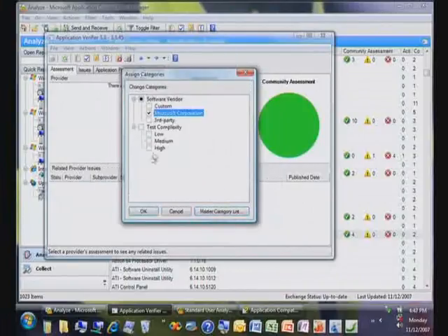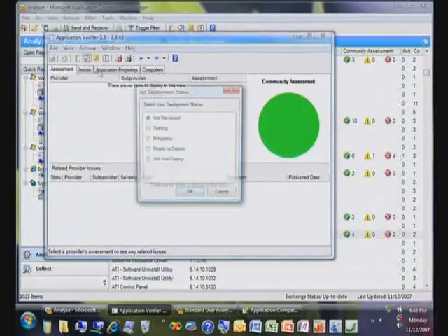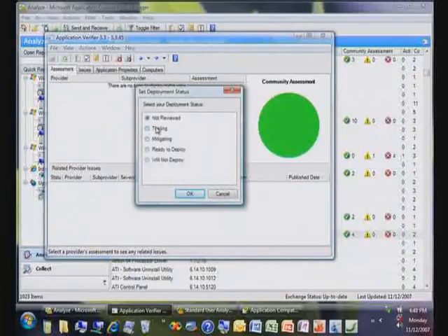So this is made by Microsoft, probably going to be fairly hard to test. Right? I can keep track of where I am in the process. Have I not started? Am I testing it? Have I finished testing and I know what's wrong with it? Or is it ready to go? Or have I decided not to go? Because that's another important aspect of the testing process, is that you will probably find a lot of software that you are not interested in keeping going.